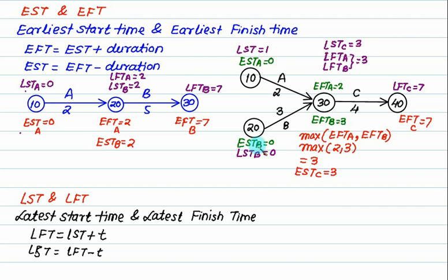Monday, Tuesday, Wednesday, and this will finish. If you don't have labor on Monday, you can delay it by one day. You collect your labor on Tuesday and start it, and by Wednesday it is finished. So if you do this calculation, you can adjust your resources. That is called slack.